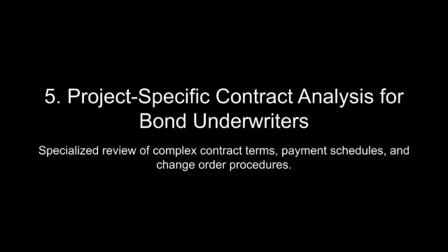The foundations of liquidated damages: proportionality and enforceability. At the heart of any liquidated damages clause lies the principle of proportionality. For the clause to be enforceable, the damages specified must represent a reasonable estimate of the losses the project owner is likely to incur due to delays or non-performance.